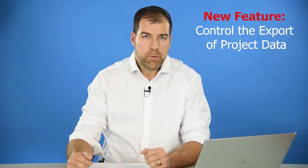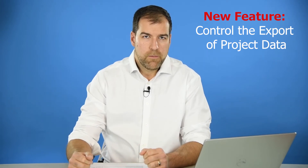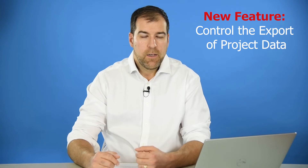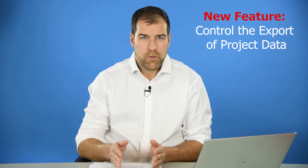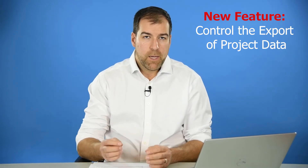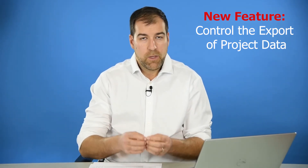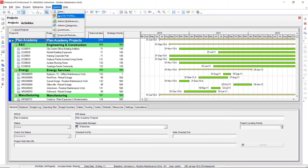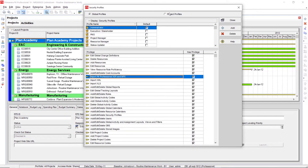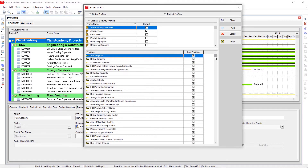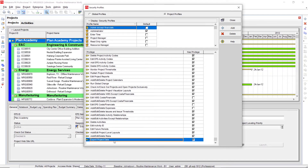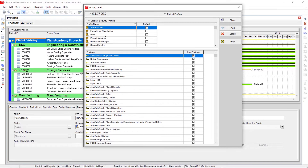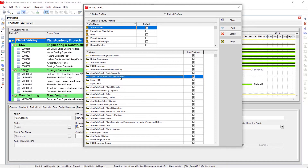For administrators, there's a new permission for exporting data that gives people the ability to export data to Excel and other places. Before, that permission was bundled in with the import permission, but now they've separated them. Go to Admin > Security Profiles > Project Profiles and at the very bottom you'll see the new permission: Export Project Data. The import permissions have also been separated and are now on the Global Profiles area — XLS, XML, P6, XER, and MPX.